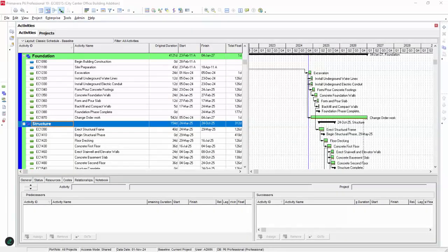Everyone, in this quick tutorial, I will show you how to display multiple flow paths in Primavera P6. This is a feature that helps you identify various paths, or various chains of activities, that drive the projected completion date of the project. It is said that those paths control the project end date, so we want to identify